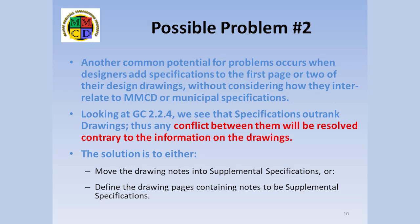A second situation I see frequently is as follows. Designers add specifications to the first page or two of their design drawings. From a designer's point of view, this makes sense to ensure their design assumptions and specification requirements are easily available to the design reviewer and to the superintendent. However, if this is done without considering how these specifications interrelate to MMCD or to municipal specifications, the potential for conflicts is likely. If we look at GC 2.2.4, we see that supplementary specifications rank 5th, while project drawings rank 7th. Thus, any conflict between them will be resolved contrary to the information on the drawings. Obviously, this is not what the designer, and likely the owner as well, want to happen.